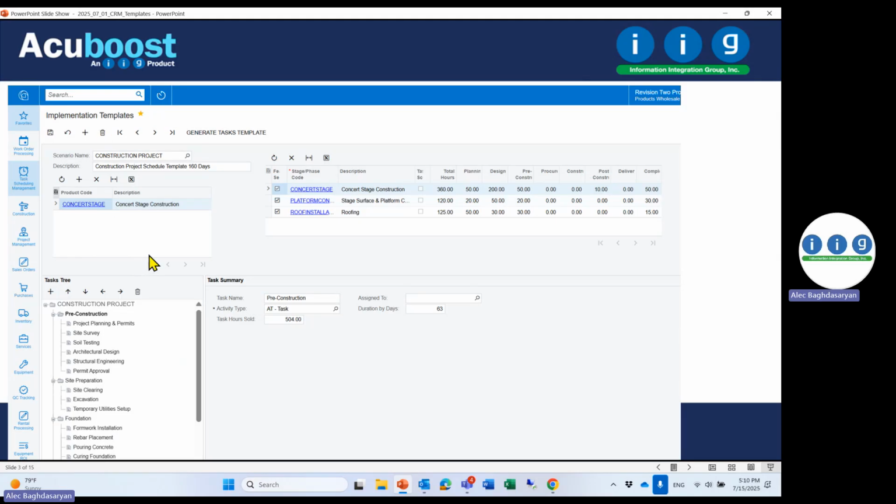Notice that we have the ability to enter hours to complete each one of these tasks and a duration. And the system will go through and add them up. It will come up with the hours for each one of these tree structure levels. And of course, for each CRM task, we also allow you to put in the phases that you need to complete. So if you wanted to have a site survey, the rebar replacement, or pouring of the concrete, to have securing and so forth, you can have different stages of that task's work defined, and hours are tracked and entered for each one.